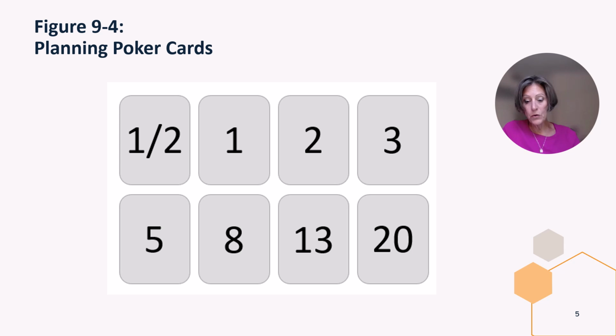So if the team agrees to work on 3 user stories during the next 2-week sprint, they are agreeing to deliver the completed features for these 3 stories. During the subsequent sprint retrospective, the Scrum Master will collect metrics to determine the accuracy of the estimate. By incorporating these learnings into the next sprint planning meeting, the Scrum process encourages adaptation and continuous learning.